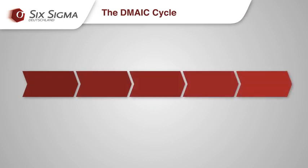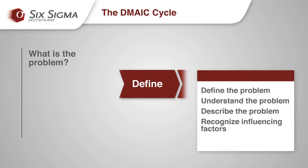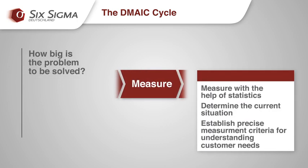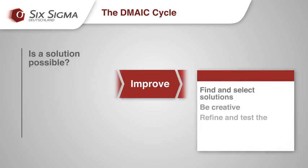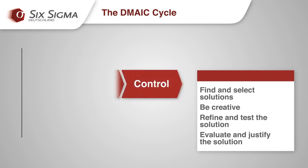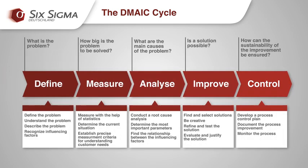The Six Sigma method employs a strict five-phase project model known as DMAIC. Define phase: the definition and description of the project goal, the clarification of customer requirements, description of current process situation and a general overview of the process to be improved. Measure phase: baselining the current process and a rough estimation of problem root causes and the establishment of their measurements in order to verify these later using statistical tools. Analyze phase: process and data analysis, verification of the true root cause of a problem or defects using statistical tools. Improve phase: development and selection of solutions for the problem as well as the implementation of steps for improvements. Control phase: control of improvement steps with detailed description of new process steps, project closure and before-after analysis of the new process with new data.